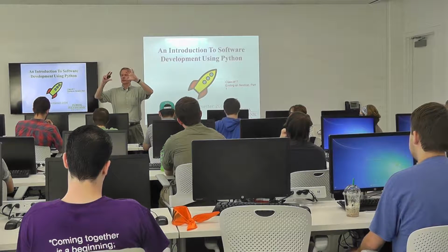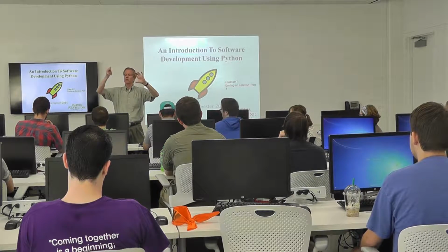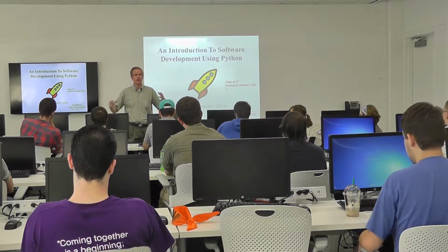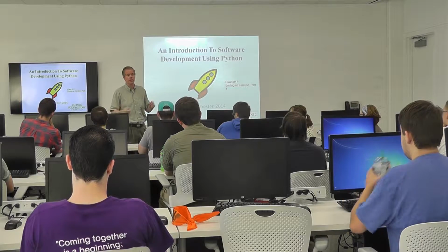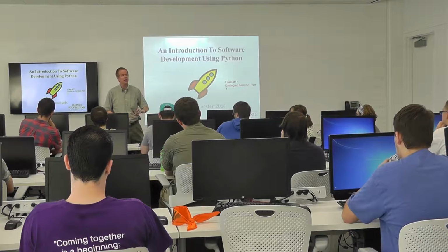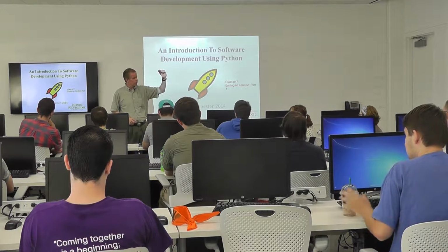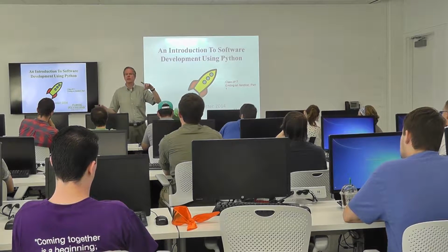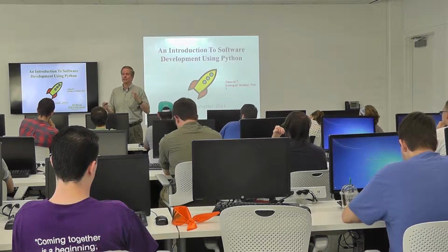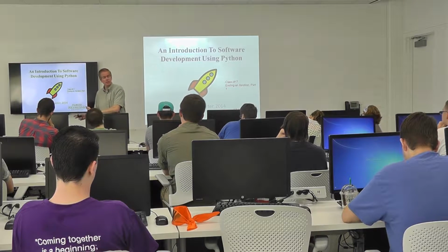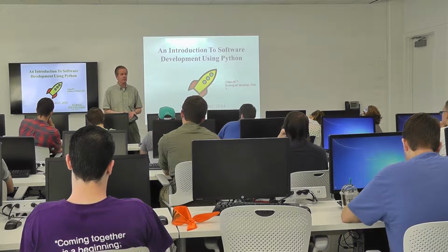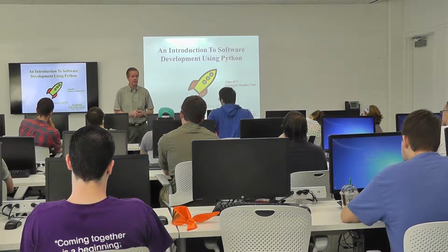So we took a look at the user stories and we said, how about we chop those up into tasks? So we created tasks, and a whole bunch of tasks equal one user story. We're pretty comfortable with that. Now we had estimates for our user story, which is good, because we like to get started. When we broke everything up into tasks, we said, let's take a look at the tasks now, which are a little bit closer related to what we're actually going to be developing for our software, and let's come up with a new set of estimates for those tasks. Fantastic, so we got that one taken care of.